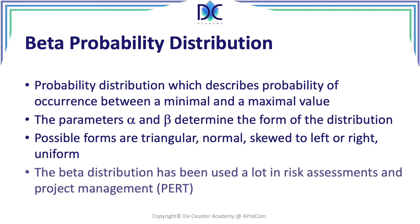The beta distribution has been the basis for the calculation of PERT assessments. The beta probability was the basis to find the PERT formula: (a + 4m + b) divided by 6 for the average, and the standard deviation (b minus a) divided by 6.